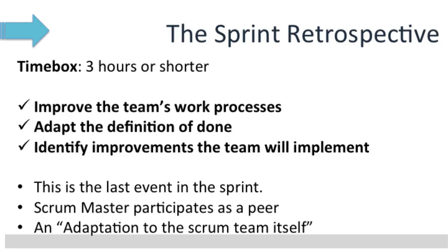And while the Scrum Master has jobs like keeping the meeting in the time box of 3 hours, making sure the meeting is positive and productive, they also participate as a peer, because inspection and adaptation should be done with them as well.